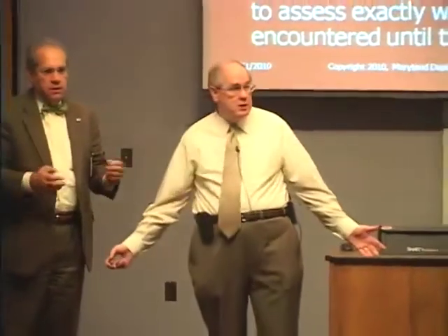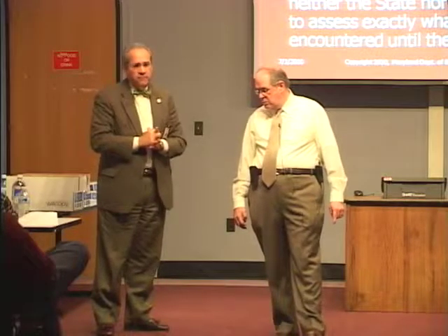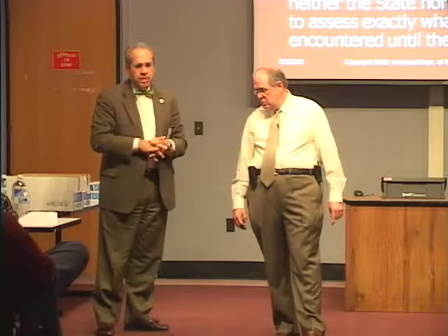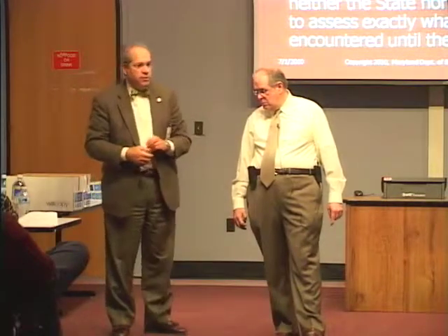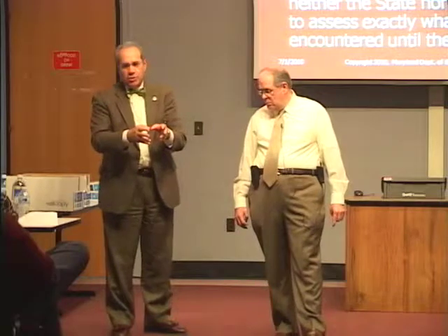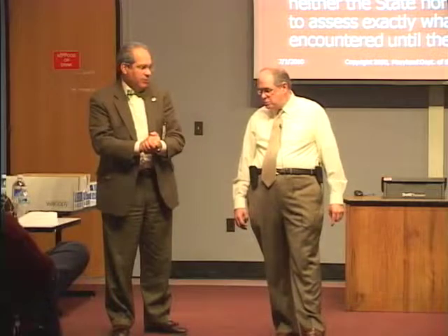Does everyone know what CPI is? Consumer Price Index. What you might not know is that there's probably 100 different CPIs, and depending upon which one you choose, will greatly influence your percentage increase or decrease. Again, when I would do union contracts, they would always pick the CPI that historically produced the largest increase, and we would talk about that. So there are significant differences.